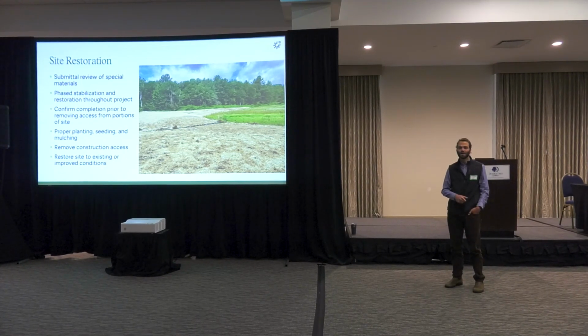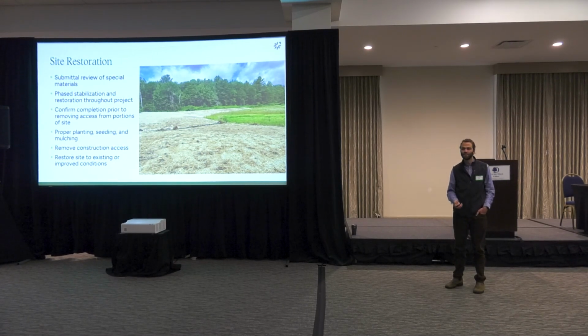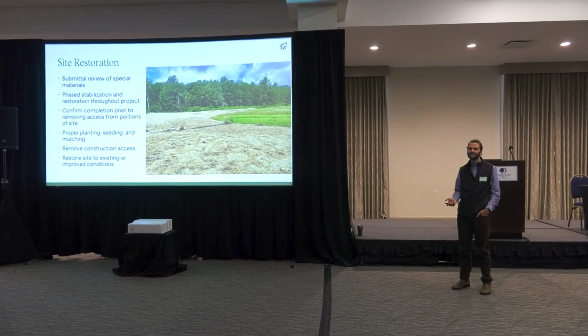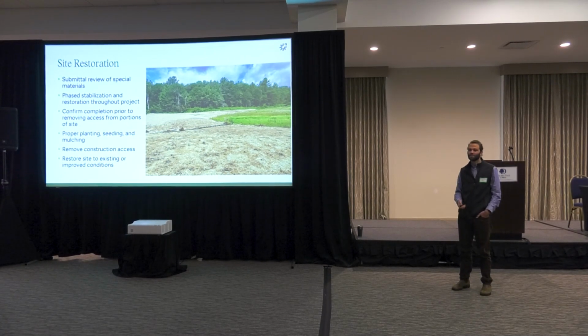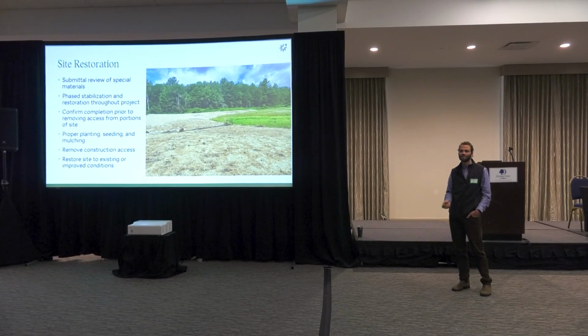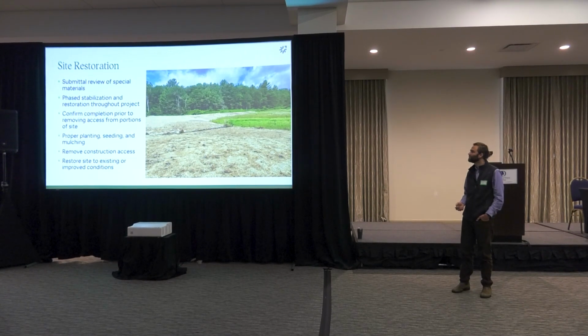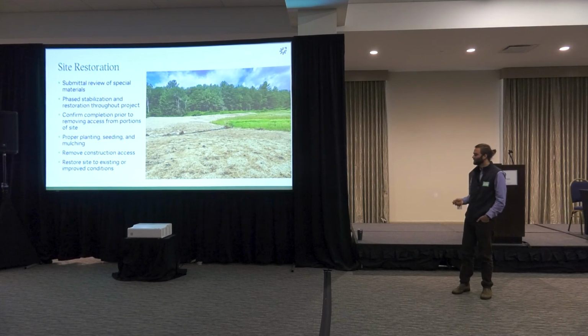Often the project is mostly done, the river's restored, the dam's gone, and the contractor is ready to get out of there. But we want to make sure that the site is left in good condition, that the landowners don't get upset that things were left in place, that the ruts were left in place on the access that weren't there before. So we really want to make sure that before equipment's off the site, it's acceptable and ready to be demobilized from.